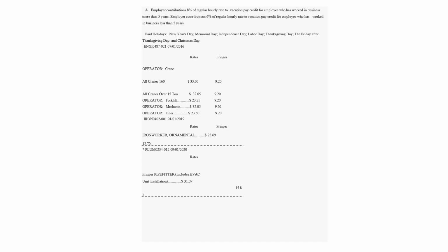2, fringe benefits are additional compensation provided to workers beyond the basic hourly rate. Fringe benefits may include items such as health insurance, retirement contributions, vacation pay, and other benefits. The fringe benefit amount is usually expressed as a monetary value per hour worked. 3, the total compensation is the sum of the basic hourly rate and fringe benefits. For accurate payroll calculations, it is essential to consider both the pay rate and fringe benefits when determining the total amount to be paid to workers.